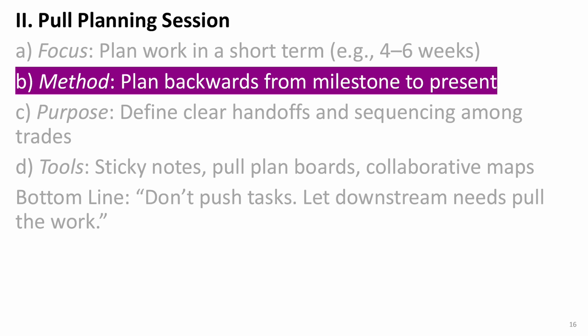Instead of looking forward, pull planning sessions actually plan backwards from a key milestone back to today. This way, we make sure every step clearly leads up to that milestone. Each crew tells us what they need to be ready for the work to start. Therefore, the involvement of last planners, including superintendents of on-site teams and subcontractors, is super important, as they can provide their input and insight into current job conditions.